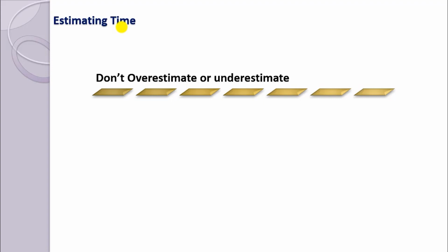I will talk about project specific, right? So if you are handling a maintenance project, then what is the process you follow? I always give it to the senior people because they know the system better. But it is important that you get validated from the team member who's going to do the work. So in estimation, most of the project managers either do the estimation themselves or give it to some other team members or project leaders who are expert.